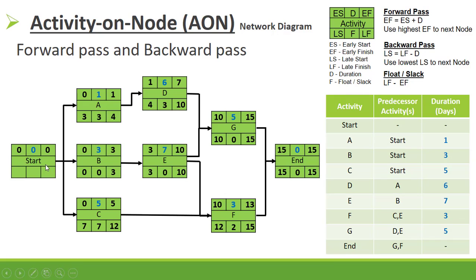The late finish values feeding into Start are 3 (from A), 0 (from B), and 7 (from C). In the backward pass we use the lowest late start, which is 0. So Start: float = 0 - 0 = 0, late start = 0 - 0 = 0.